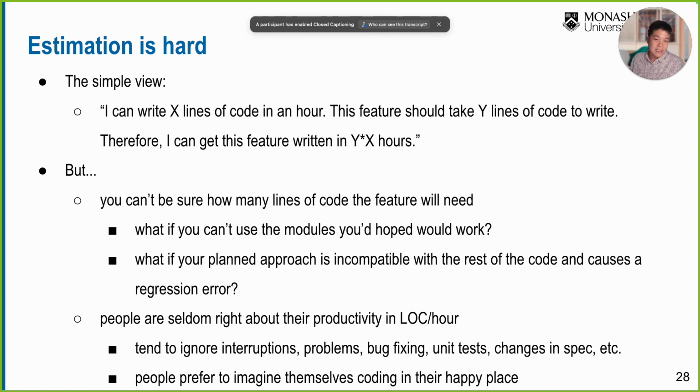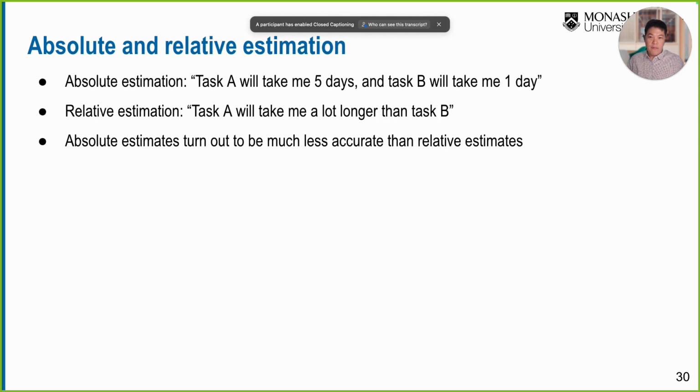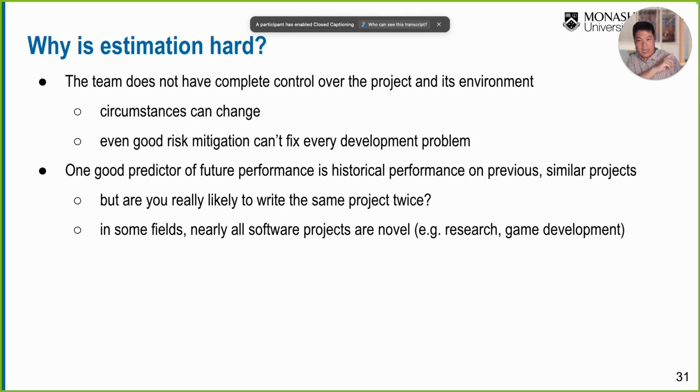In the past, some projects also estimated based on man-hours. That could be a unit of measurement. For this feature, we may need 6 hours to complete. That's the man-hour, and then you multiply by the cost, and you can estimate how much it costs to implement this feature. It is so hard. That's why we need to talk about techniques to estimate. I'm going to talk about that in the next few slides.